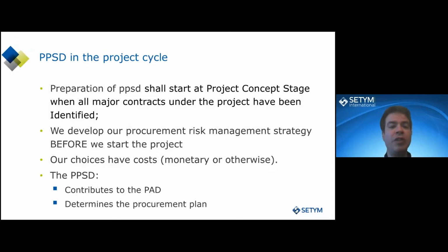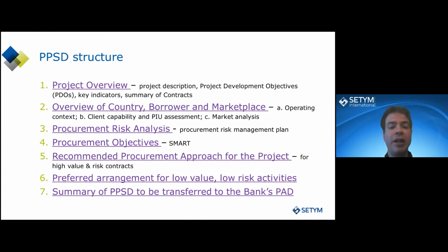So let us move on. The preparation of the PPSD starts at the concept stage, if you're familiar with all the phases of a World Bank project. So that's very early on and way before the financing agreement is signed. So our choices, once again, have cost. And as I've said, it feeds into the PAD and determines the project procurement plan.